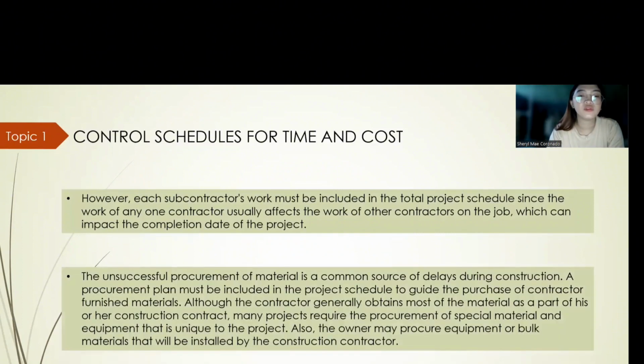The unsuccessful procurement of material is a common source of delays during construction. A procurement plan must be included in the project schedule to guide the purchase of contractor-furnished materials.